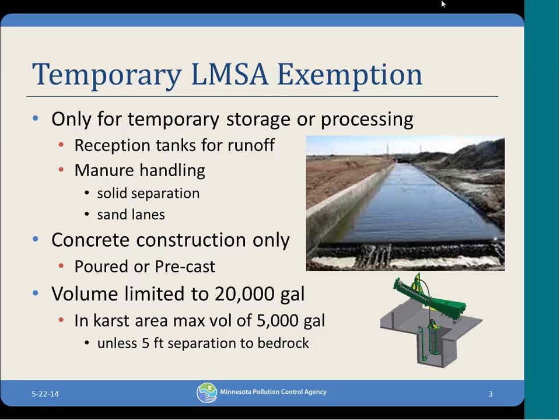And just to be clear, I'm guessing the next day they're probably not going to want skid loaders hauling forms around on the floor. Right. But they can certainly at least start tying their cage, their rebar, and they might be moving in some forms.